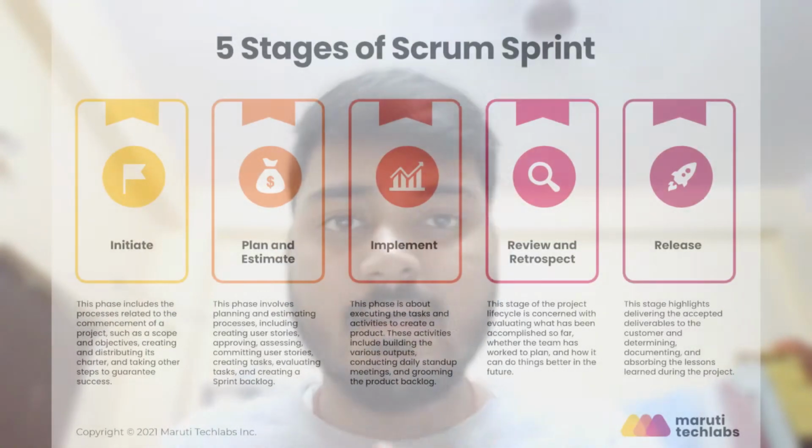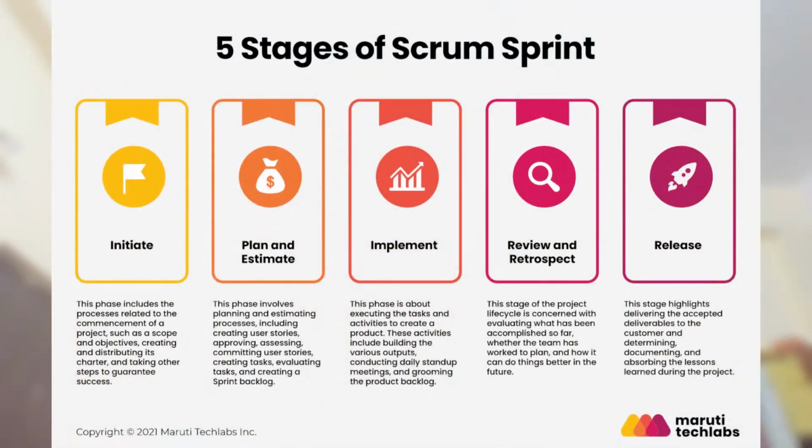In general, the sprints are of 14 to 15 days, where the initial call happens, and we discuss what analysis and what features need to be added, or what bugs were incurred in the previous release. So a sprint is basically the starting and the ending of a complete release. From development to deployment, everything is covered within each single sprint.